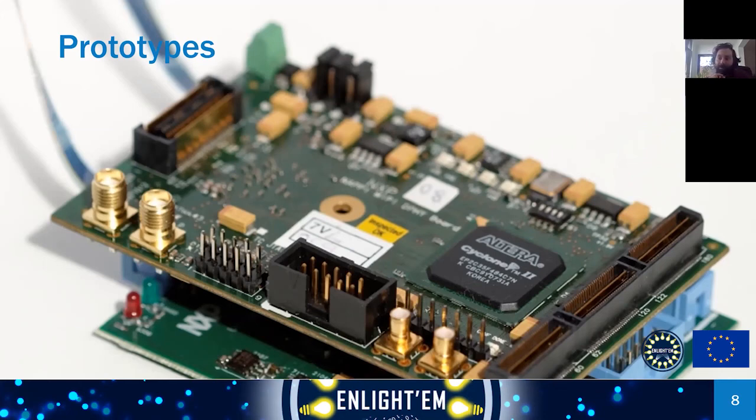And then when it comes to actually building your prototype, I always recommend that you build it in stages, which allows you to do troubleshooting and debugging for much smaller systems, especially if you're dealing with quite a complicated late-stage prototype. Debugging a subsystem of your prototype is always easier, takes less time, and at the end of the day is a lot less frustrating for people.